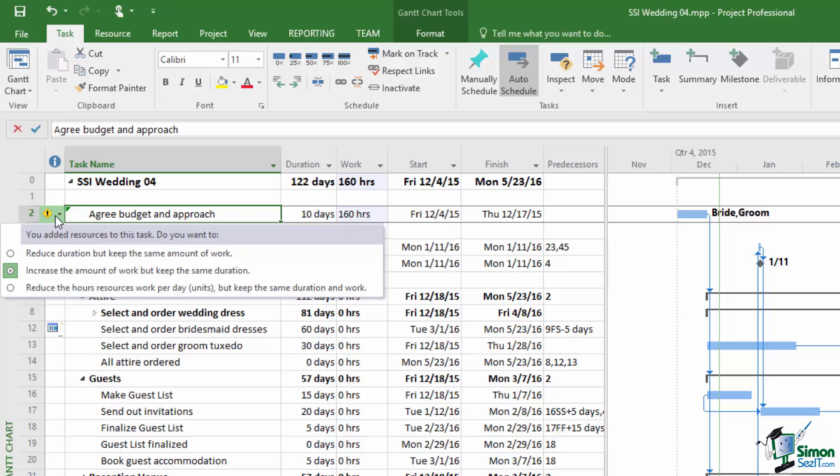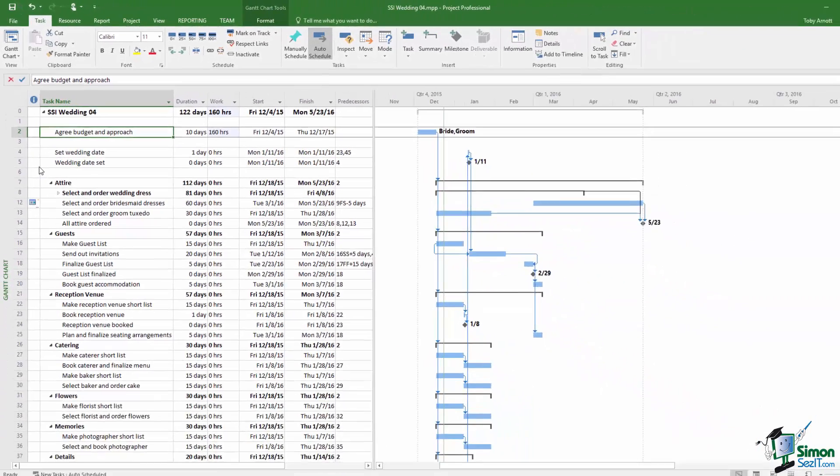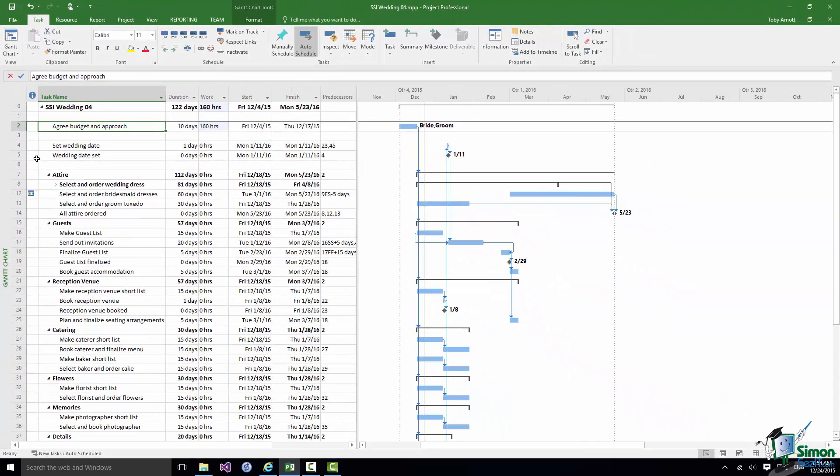We're not going to say that because the bride and groom are working on it it's only going to take half the time. We decided it was a ten day task. We don't make it a five day task because two people are working on it. That set of arguments about work and duration is what we're going to look at in the next section. And I hope that will explain why we get these options and which one is the right one to choose. But on this occasion we're going to go for the default option which is increase the amount of work but keep the same duration. When we do that Project 2016 is quite happy. The warning's gone away. We've got our 160 hours of work and the bride and groom are assigned to that task.